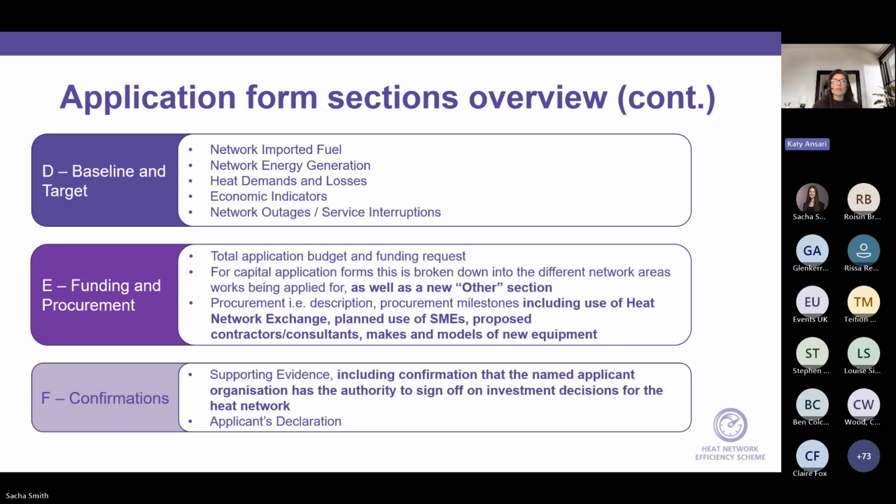I would also say you need to separate the VAT costs from the total project costs, so you're aware of how much the project costs and the VAT amount separately, especially if VAT is irrecoverable. You need to add that into section E, where there is a part where it says where you can claim VAT if it is irrecoverable. If that is the case, we will need supporting documentation to explain why you're unable to recover VAT, so we will need evidence of that.